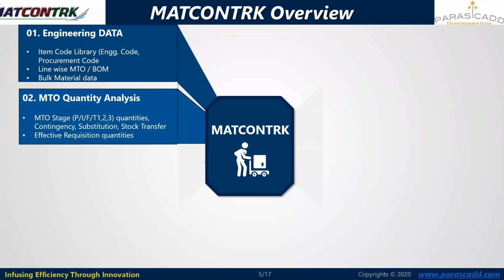Second stage is the MTO quantity analysis. Now we are receiving various stages of MTOs such as preliminary, intermediate, final, and top-up MTOs. It becomes necessary to find out the effective quantity for the procurement. Also, we are considering here the contingency quantity for the escalation purposes.